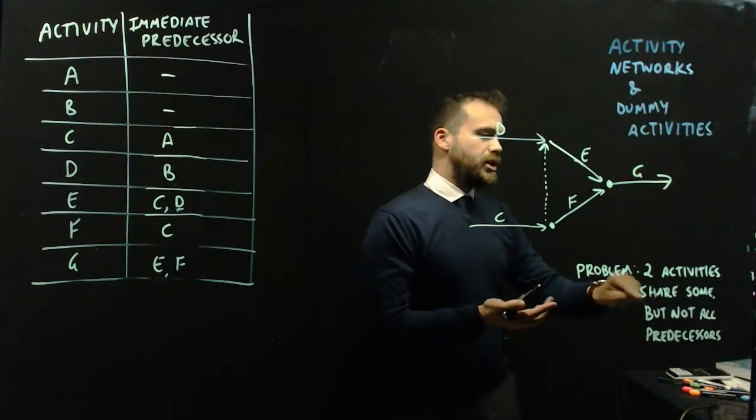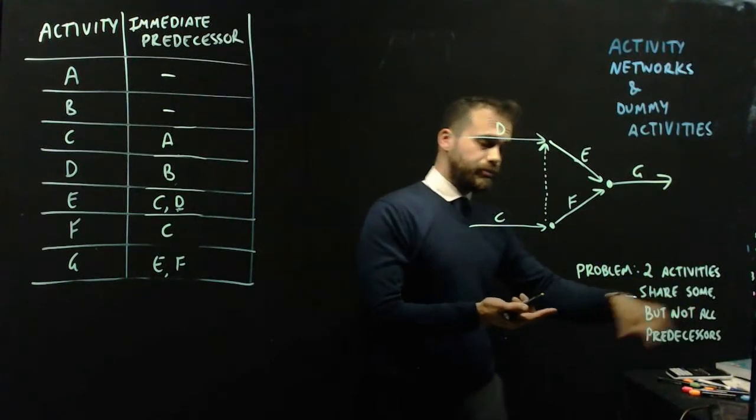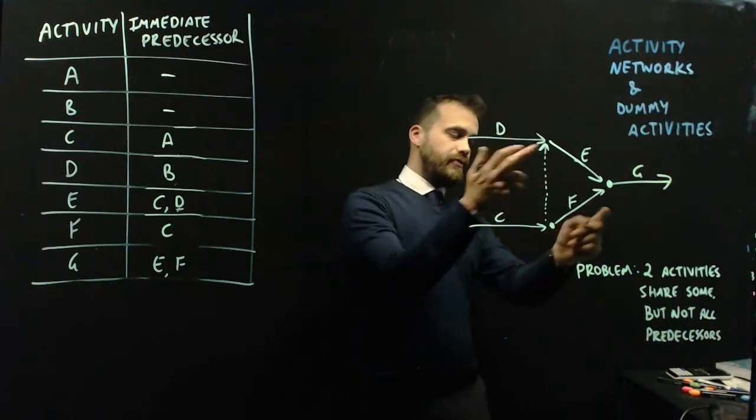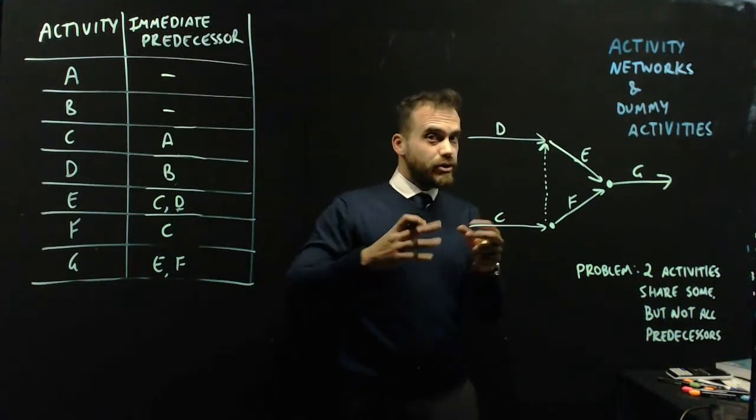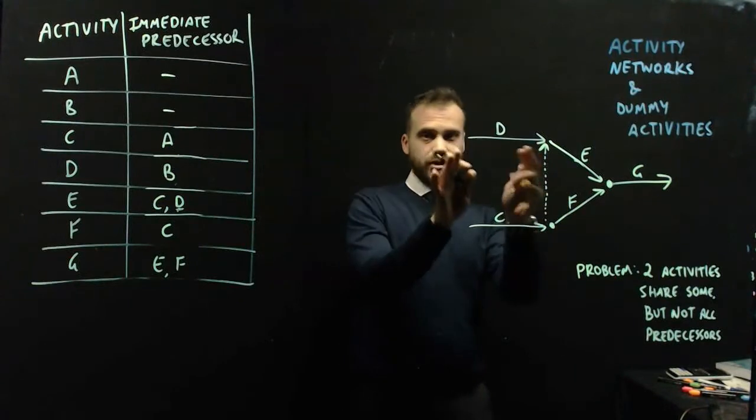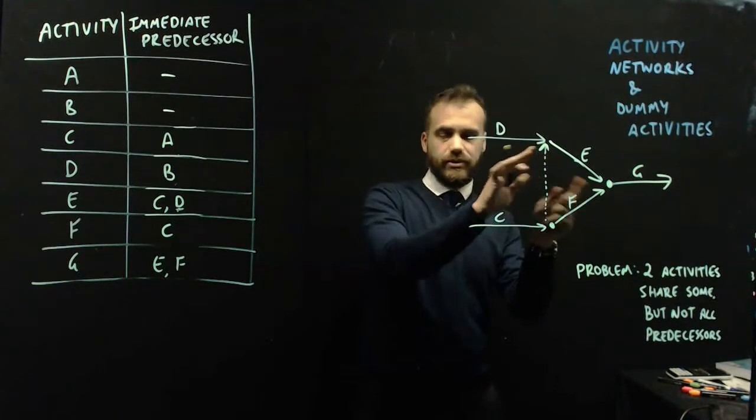This problem where two activities share some but not all predecessors. So E and F share some. In this case, they share C as a predecessor. But they don't share all because F doesn't have D in common with E.